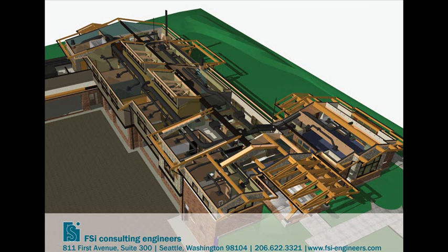Yeah, a lot of the value in drawing everything in 3D is being able to route around and avoid conflicts with the other disciplines. And you're saying a lot of what we showed in our presentation is just mechanical. Did we have an electrical that was doing Revit? In any of these cases, no. We didn't have a structural who was doing Revit. We were the only sub working in that field. We drew our ductwork to avoid the existing electrical based on walking around in the field, knowing where the existing cable trays and whatnot were, and we just dodged them.